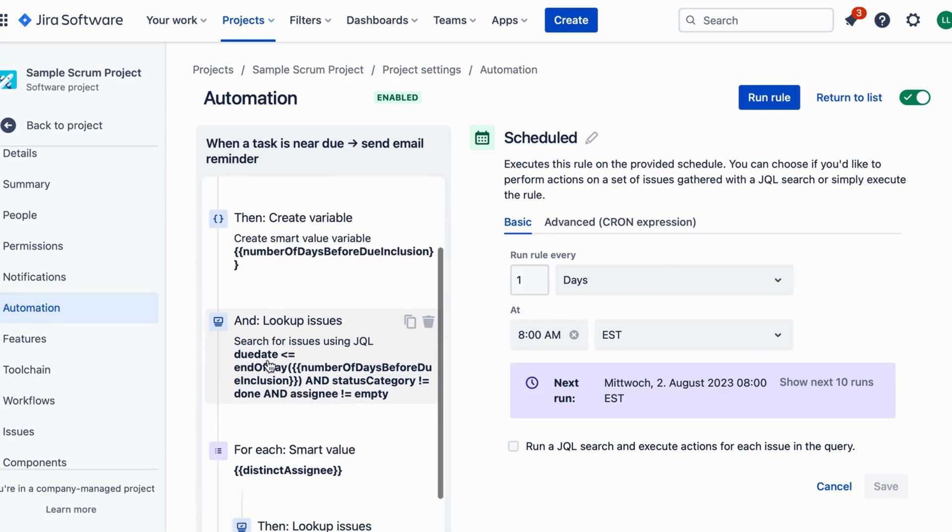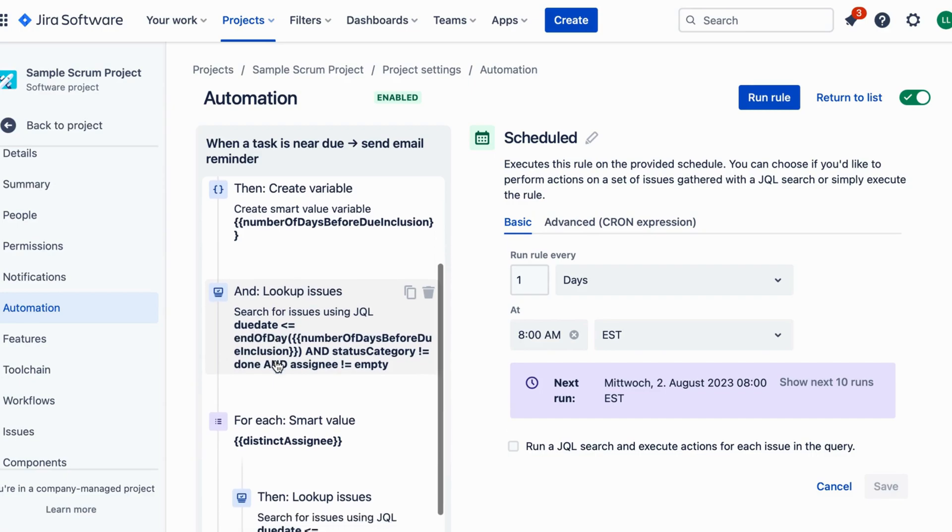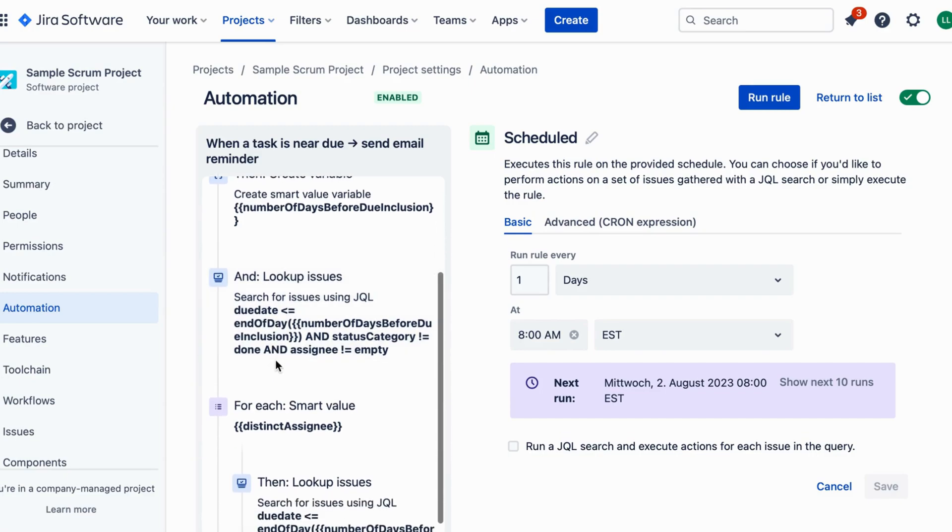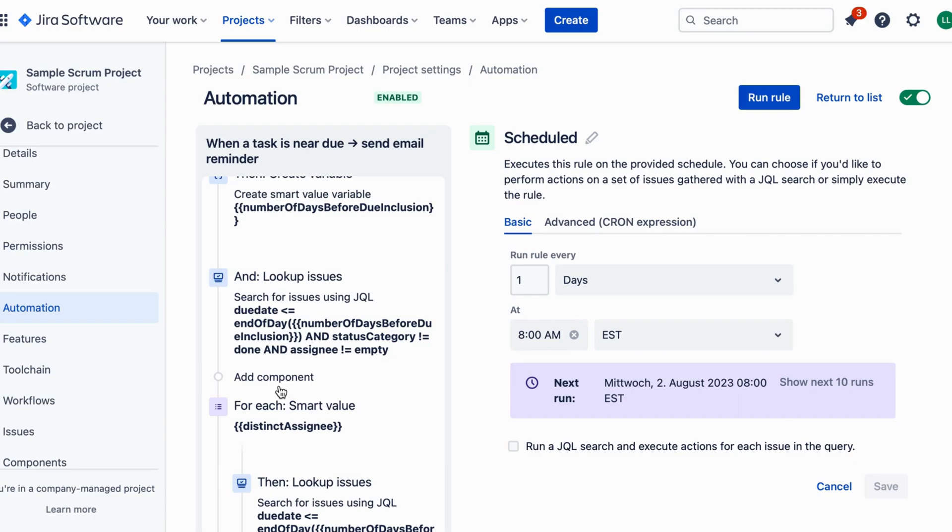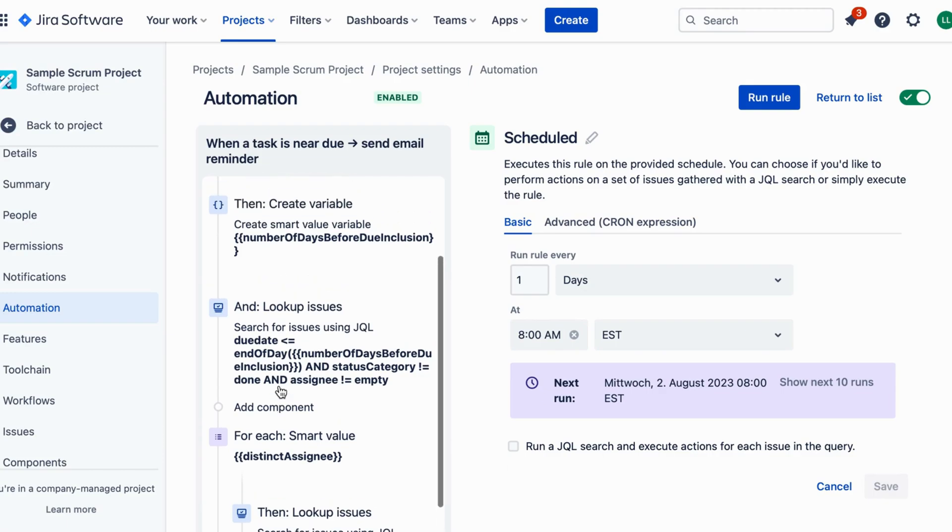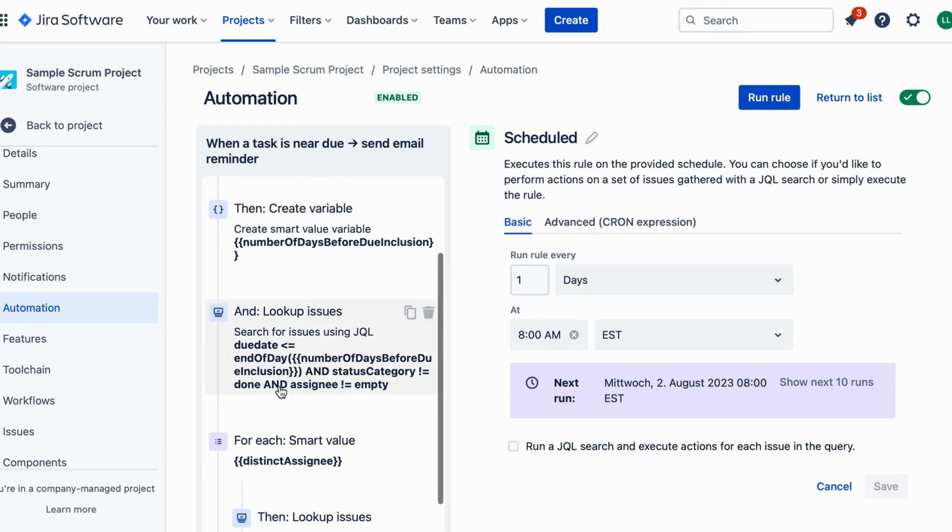In this step we define the condition for sending the reminder email. For the from value field, leave it blank as you want to capture any changes made to the due date. Then in the two value field, set the condition to within the next x days. You can specify the number of days you want, for example three days.